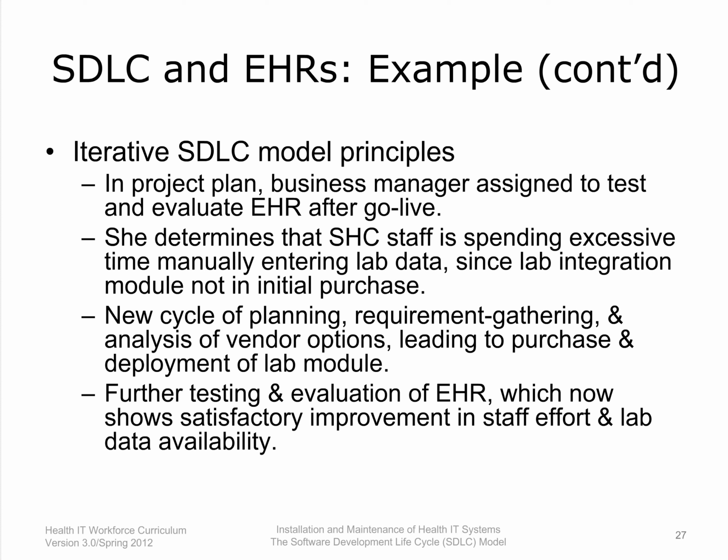In her analysis, she determines that the SHC clinic staff is spending excessive time manually entering laboratory data, since a laboratory integration module was not part of the initial purchase. Thus, the staff enters a new cycle of planning, requirement gathering, and analysis of vendor options, leading to purchase and deployment of a laboratory module. Subsequent retesting and re-evaluation of the EHR now shows satisfactory improvement in staff effort and availability of lab data.